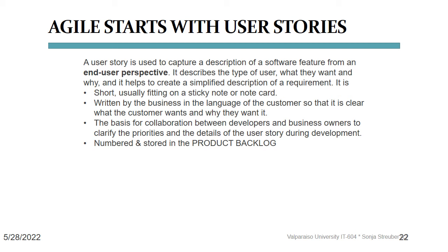Writing user stories is hard. They have to be short, typically no longer than one sentence, so they can fit on a sticky note or a flashcard. They have to be written in the language of the end user, not the engineer or developer, to ensure that the words used show exactly what the user wants and how and why they want it. Once they're done, these user stories are collected and indexed in the product backlog.